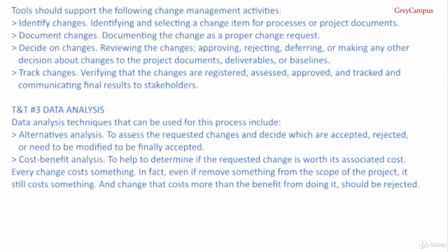Tools should support the following change management activities. Identify changes, identifying and selecting a change item for processes or project documents. Document changes, documenting changes as a proper change request. Decide on changes, reviewing the changes, approving, rejecting, deferring or making any other decision about changes to the project documents, deliverables or baselines. Track changes, verifying that the changes are registered, assessed, approved and tracked and communicating final results to the stakeholders.